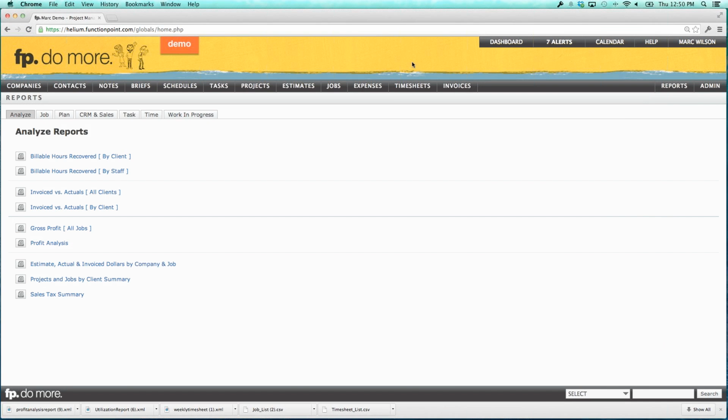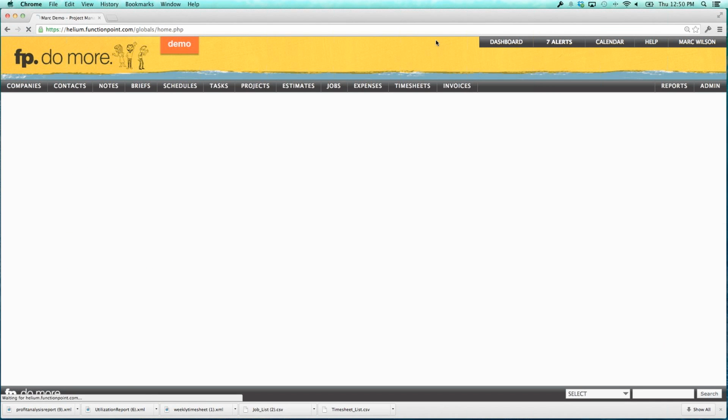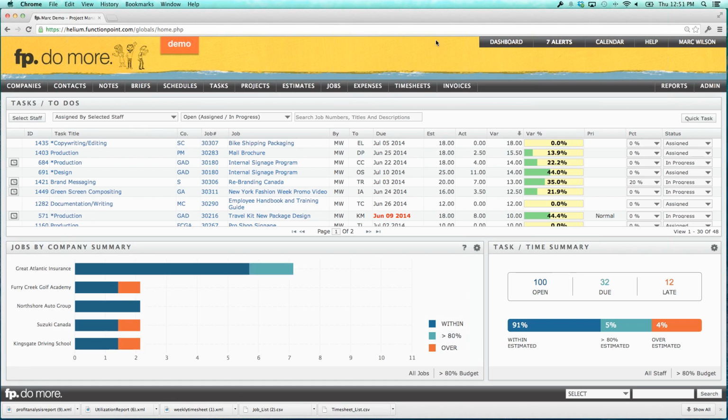And it's always difficult to track true profitability when you're looking at staff time. A conversation I was having with an agency just recently was, they'll have a staff person whose target hours for the week is 40. Their billable target percentage might be 80. But, oftentimes, because it's the nature of the business, they might put in 55 hours that week. Well, they're on salary. They're not getting paid based on the time they work. They're getting paid a salary. But because they put in 55 hours, the system's going to have a much higher cost of that staff person for that week. And therefore, your profitability is going to be looking lower than it actually is, because you're not paying that person for all that time.